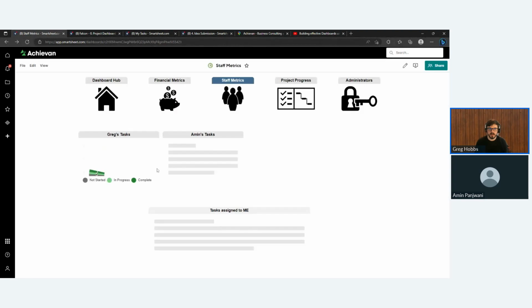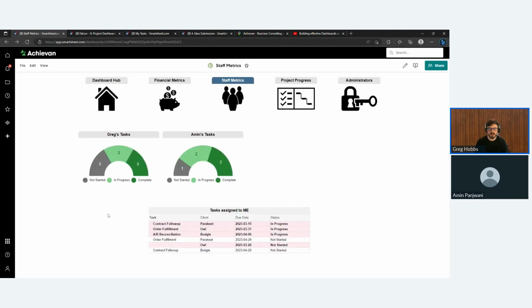But sometimes, I found this is really handy with project schedules. On the dashboard, you might just want to have a visual of the Gantt chart with just the project name and the milestones, like the really high level tasks. You only want specific ones, so you have your report filtered just to show milestones, maybe deliverables as well. But when you click on it, you want to go to the whole schedule so you can actually go maintain it. You can use that instead of just looking at the report.